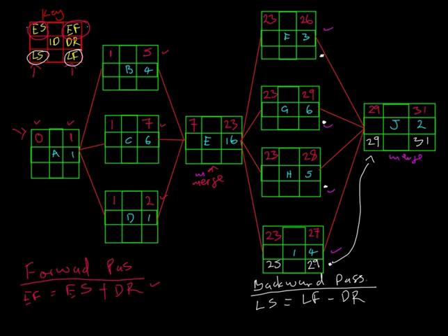All right, let's go to activity H. So like we said, repeat the rule over and over again as you work on each activity, and by the time you go to the exam, it will be stuck in your head. That's how it stuck in my head, okay? So we go to the late finish of activity H here. Remember, the late finish of each and every activity is equal to the late start of the successor. What is the successor of H?